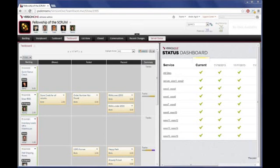So reset the conversation. Instead of saying, give us the list of everything that the system has to do and all the different things that we have to support and all the contingencies, you have to reframe the discussion. Who is the most important person for this system to support? What are the 10 most important things or the 5 most important things that that customer needs to do? How quickly can we deliver that minimum feature set and then begin to gradually add on and on and on?